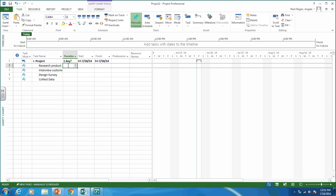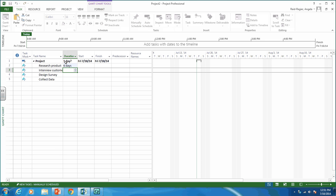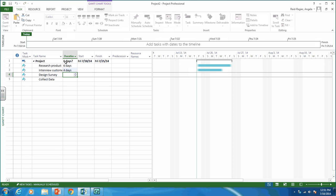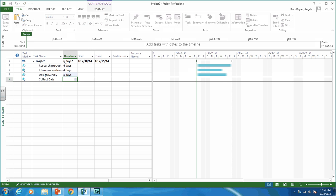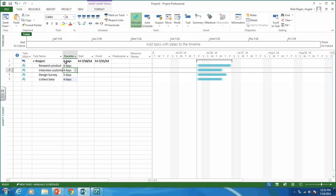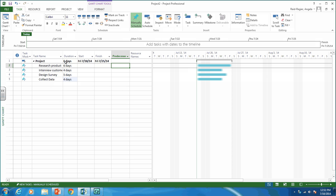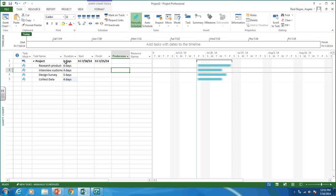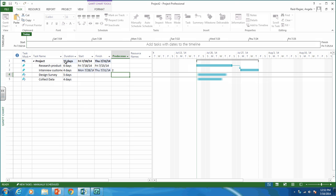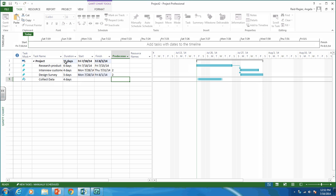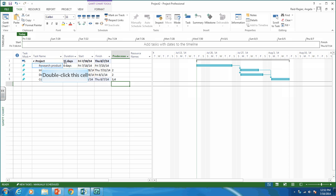We're given durations: research product is six days, interview customers is four days, design survey is five days, and collect data is four days. We're also given the predecessors. Research product has no predecessor. Interview customers has research product as a predecessor. Design survey also has research product as a predecessor. And collect data has interview customers and design survey as predecessors. So there we go — we've got our network diagram.